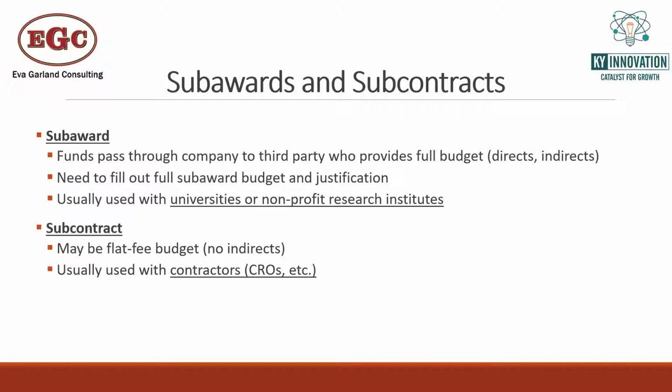Make sure that it's not, hey, this is going to be $100 an hour for somewhere between 10 and 1,000 hours. You really want to try to avoid that in terms of constructing your grant budget. As firm as you can get is very, very helpful. So when talking to that subcontractor, explain that you understand that yes, the scope can change and they can have all sorts of fine print there, but as much as possible, give you a single number, $24,000, whatever it is, so that you can put it directly into your grant budget.